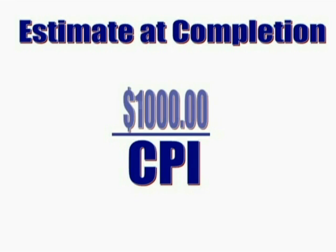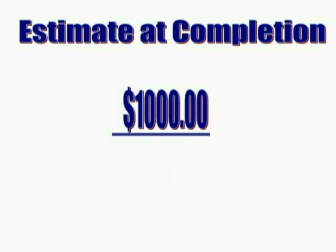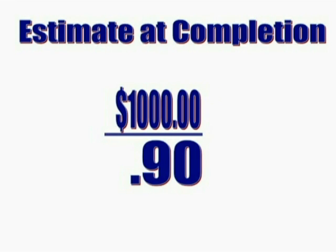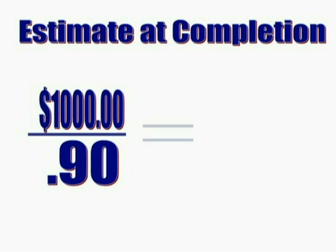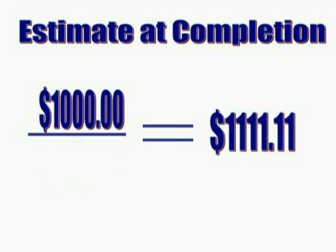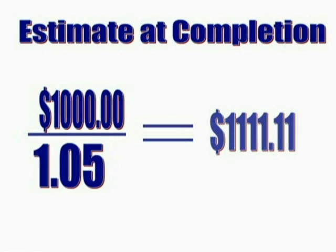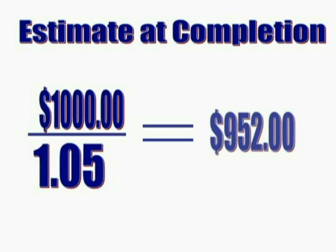If your total budget is $1,000 and you've got a CPI of 0.95, you can estimate a budgeted completion of just over $1,111 — a 10% cost overrun. While a CPI of 1.05 indicates a total cost of $952, meaning a gold star for bringing the project in under budget.